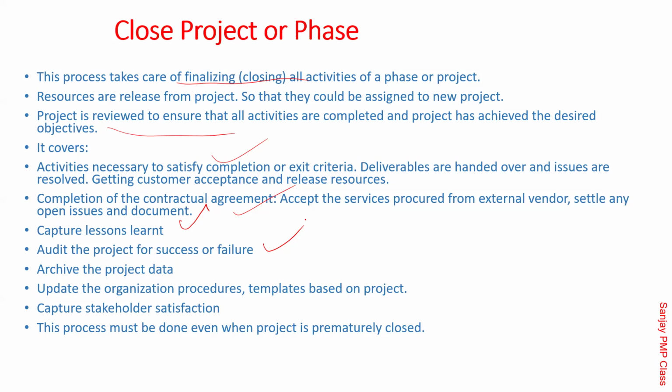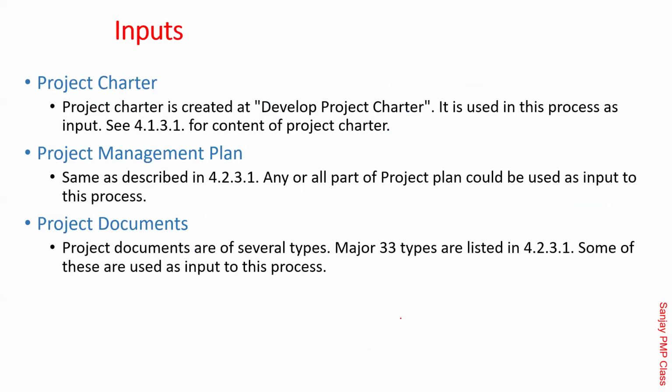Capture the stakeholder satisfaction. This process must be done even when projects are prematurely closed. The close project process you will have to do, even if the final deliverables were not accepted due to whatever, due to the customer pulling out of it and all that. Whatever happens, you need to do that.